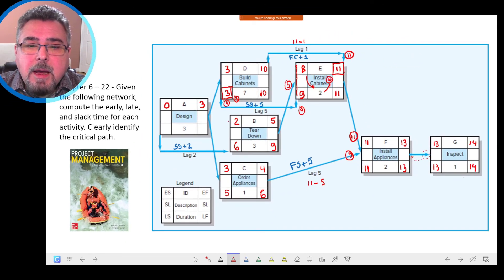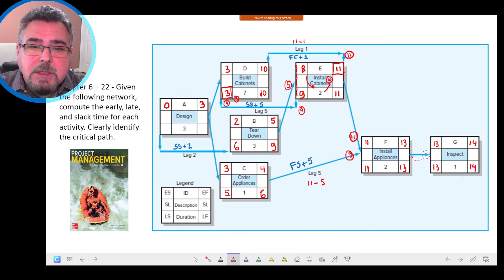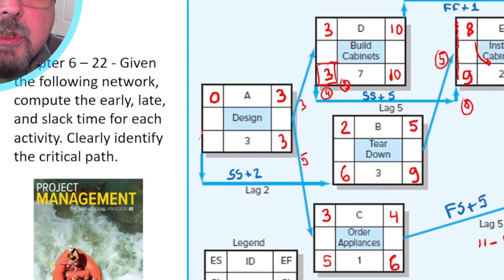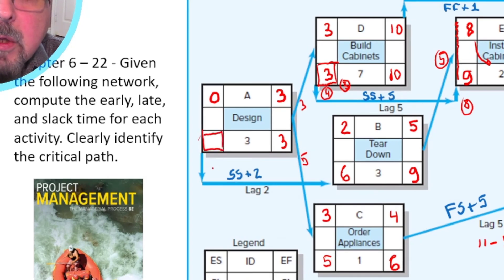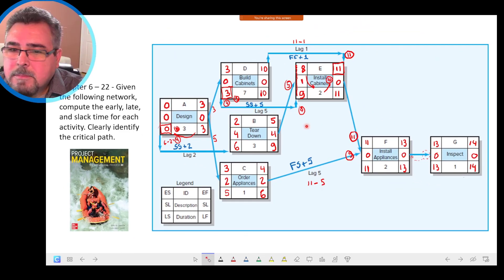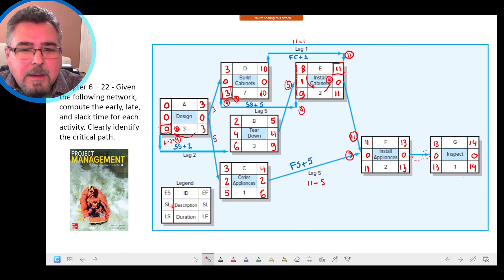Moving to Activity A, I carry forward 5 and 3 — taking the lowest, which is 3. For the late start of A, I have two conditions: 6 minus 2 = 4 from one path, and another condition brings it to 0. Between 0 and 4, the lowest is 0.